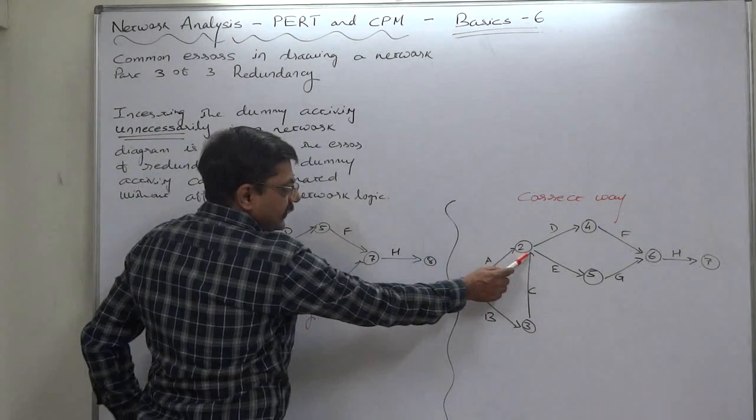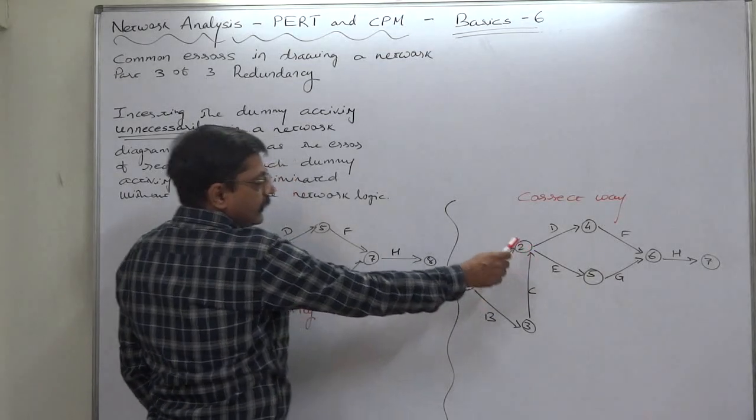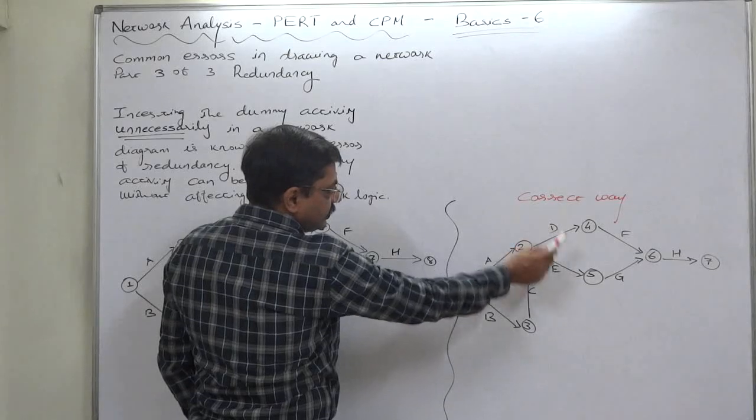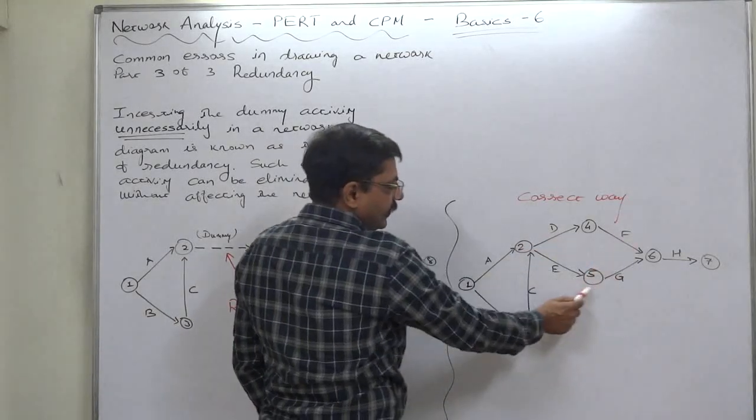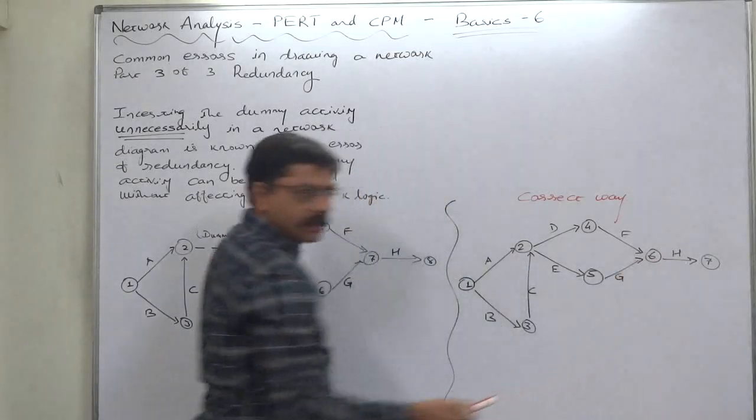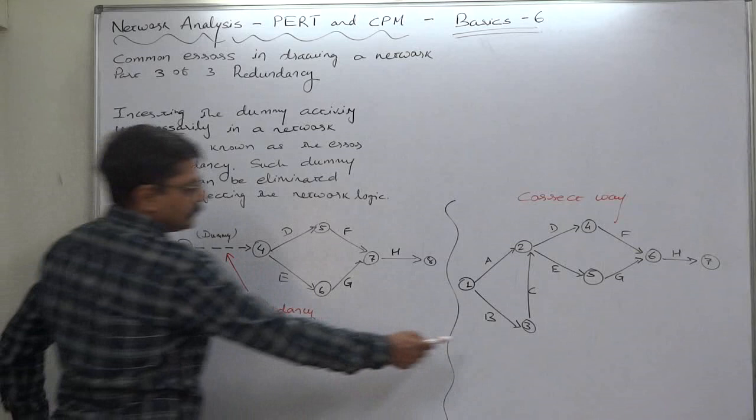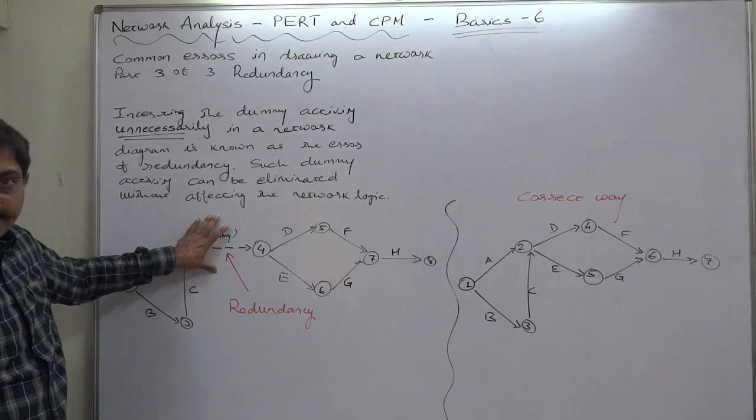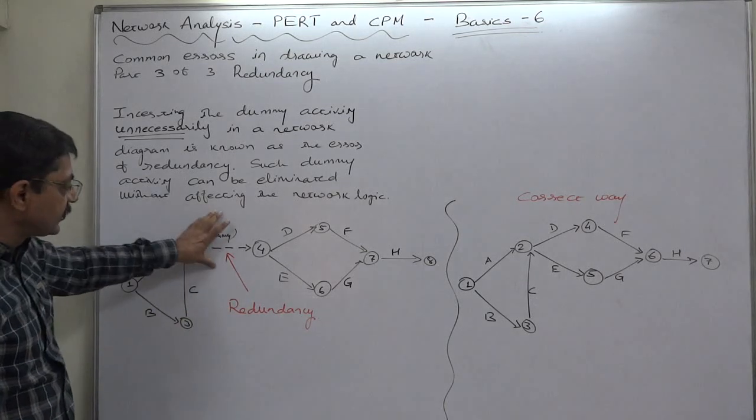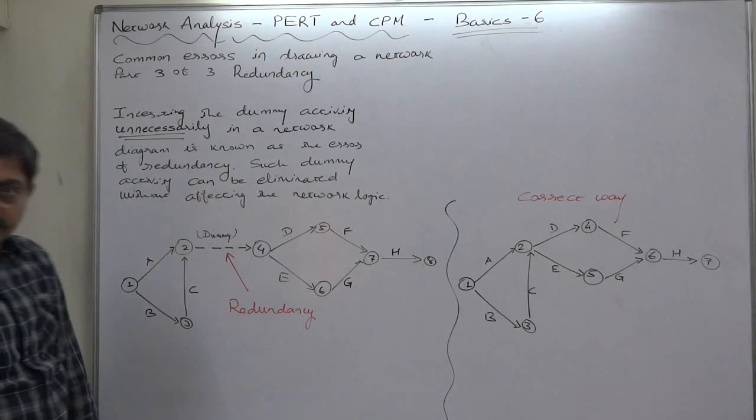A and C both become predecessors of activities D and E. D becomes predecessor of F, E becomes predecessor of G. Both are predecessors of H and so on. You can see that without affecting the logic of the network we have removed this dummy. Inserting this kind of unnecessary dummy is called the error of redundancy.